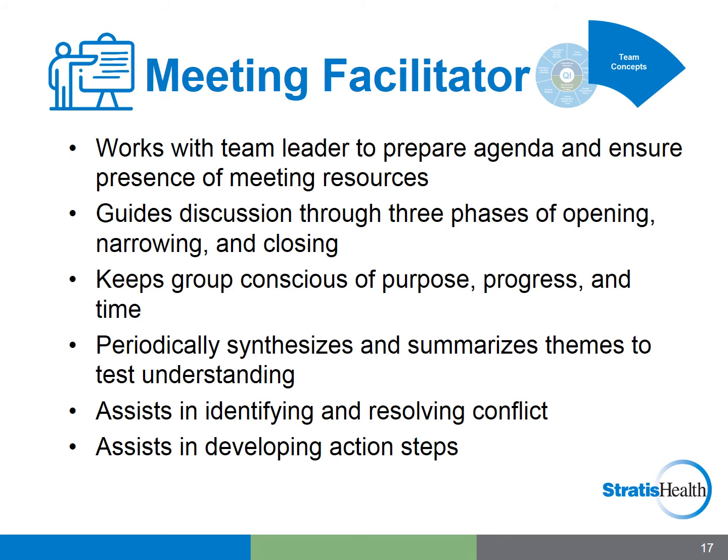The meeting facilitator often is a rotating role and is specific to a single meeting. This role works with the team leader to prepare the agenda and assure availability of meeting resources, and guides discussion through the 3 phases of opening, narrowing, and closing, that is, opening the meeting and broader conversation, helping to narrow the conversation and discussion to the topic at hand, and then closing the conversation out with necessary actions and decisions needed. The facilitator keeps the group conscious of purpose, progress, and time, periodically synthesizes and summarizes themes to test understanding, assists to identify and resolve conflict, and assists in developing action steps for the closing phase of the meeting.